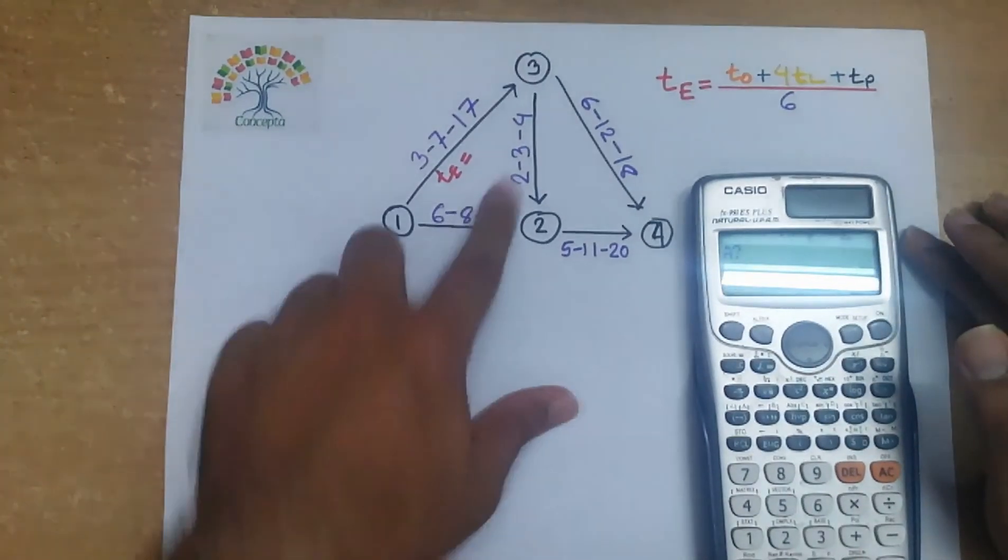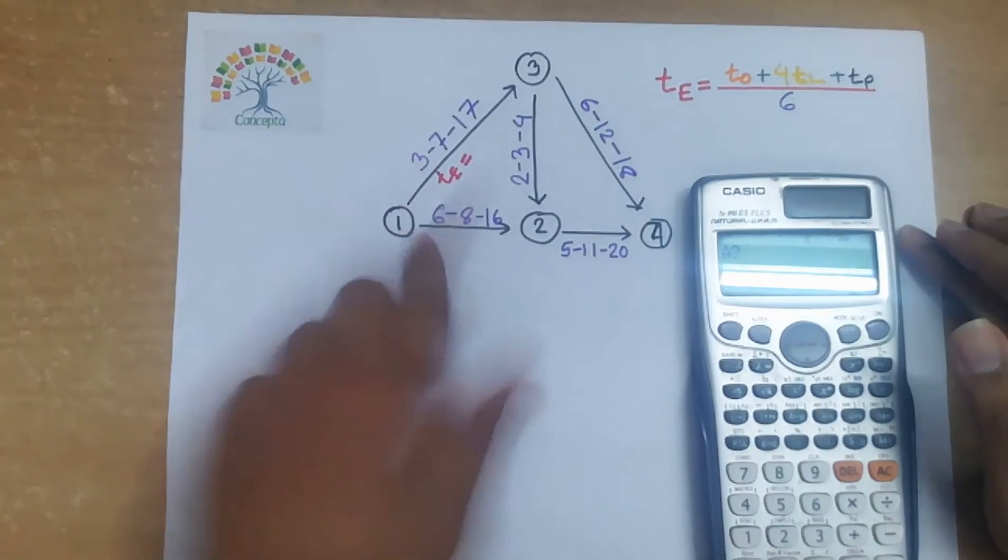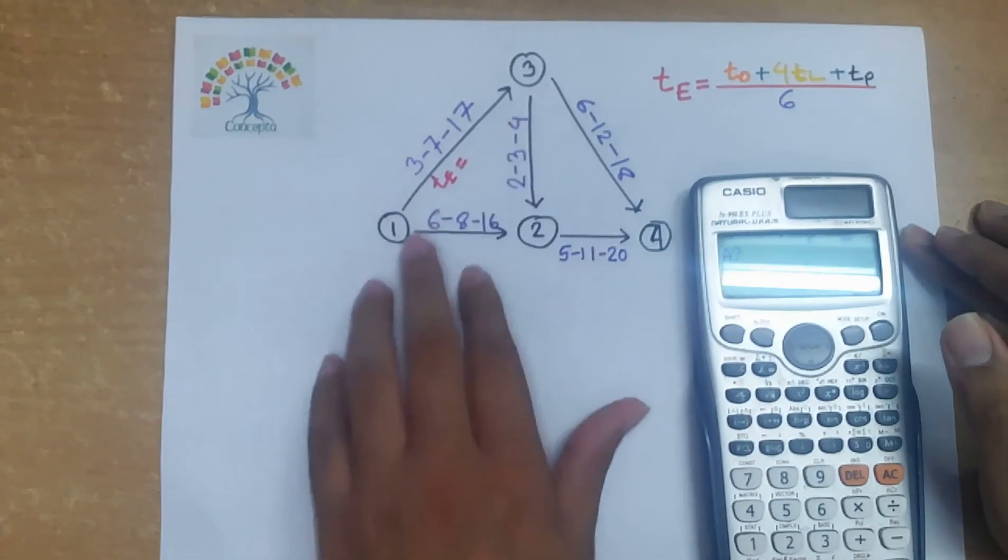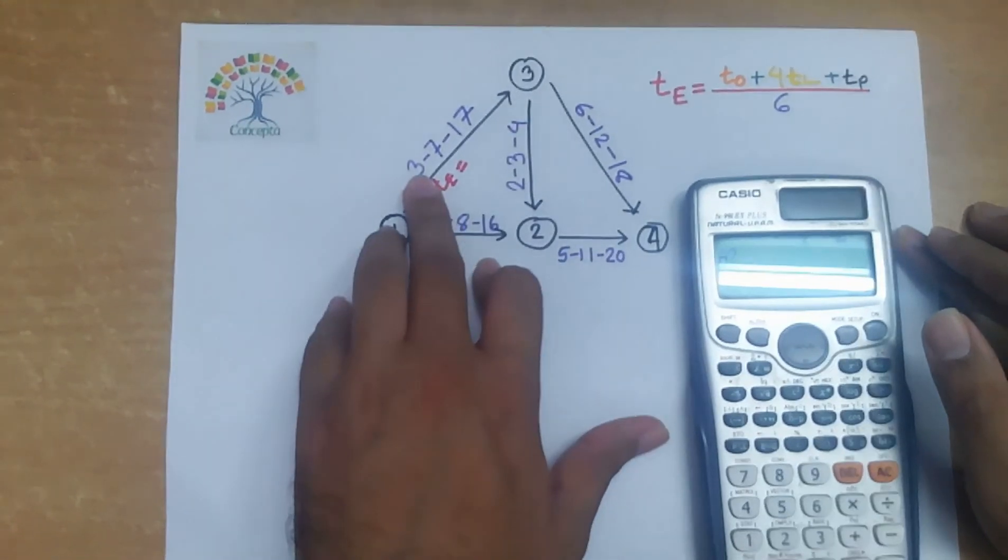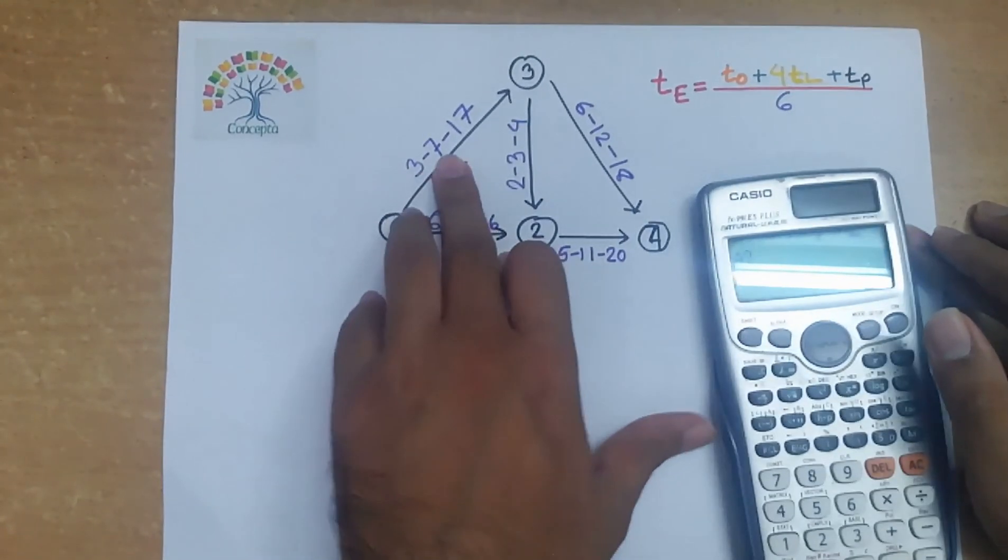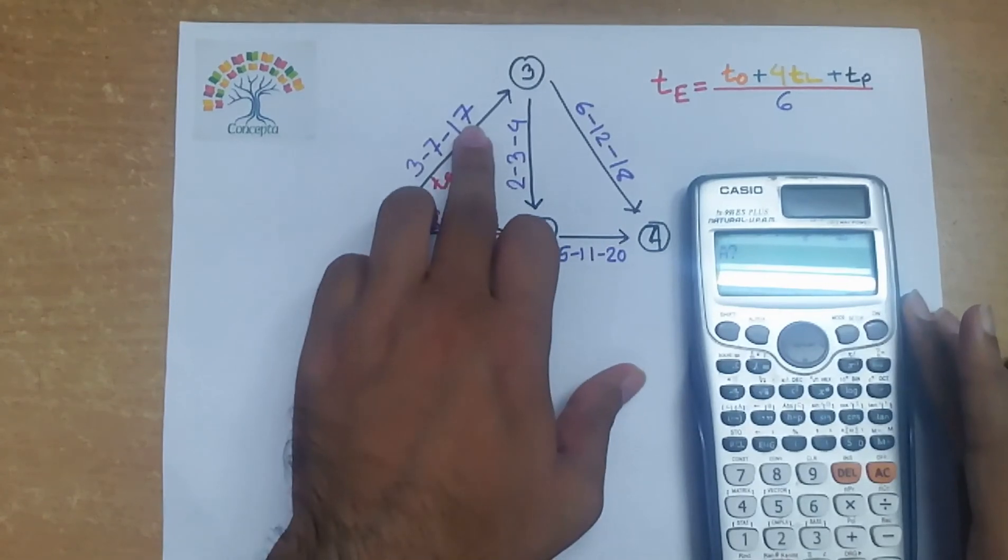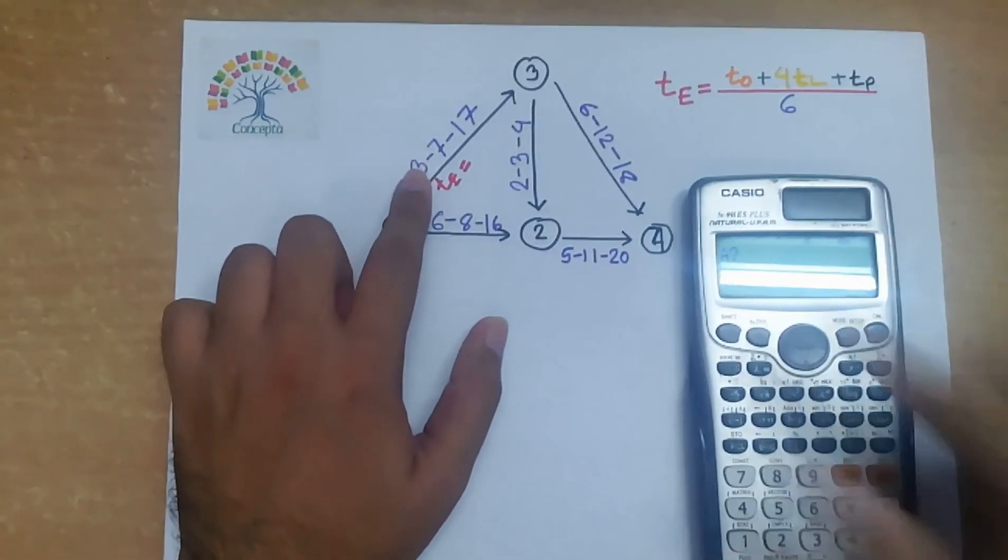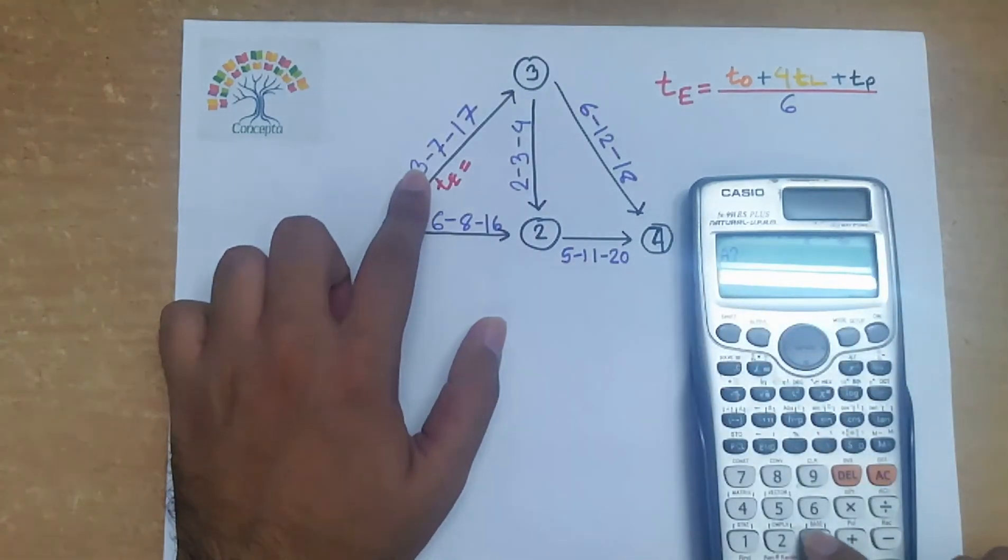So if we observe the PERT network diagram, we see suppose we will find out te for path 1-3. So here 3 represents t0, 7 represents tl, and 17 represents tp. So we will put 3. a equals to what, we will put 3.